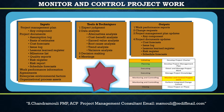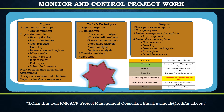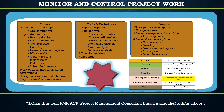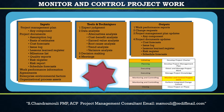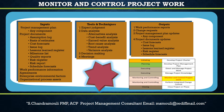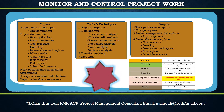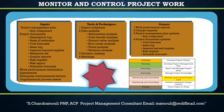The next output is Project Management Plan Updates. Project management plan updates may include but are not limited to: one, Scope Management Plan — updated when the plan on how to manage the scope or the scope baseline gets changed; two, Requirements Management Plan — updated when the plan on how to manage requirements gets changed; three, Schedule Management Plan — updated when the plan on how to manage the schedule or the schedule baseline gets changed.